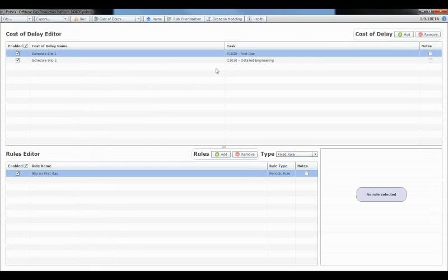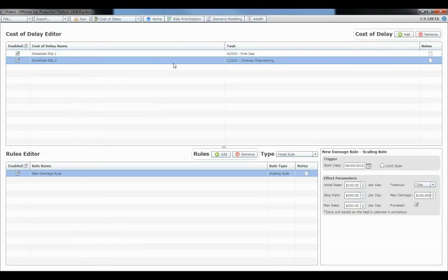This cost is a lay feature. So for those of you that are very familiar with liquidated damages, we had an EPC contractor that was very interested in doing this type of analysis. This is a really, really neat analysis. You can do all kinds of different things here. You can look at your liquidated damage exposure. You can look at the cost of project extension. You can look at, if I want to overrun a cost for a particular date that's associated with the contract, that may not be a liquidated damage, it just may be a cost to me or an owner cost. You can do that type of analysis in here, and no other tool out there does this.